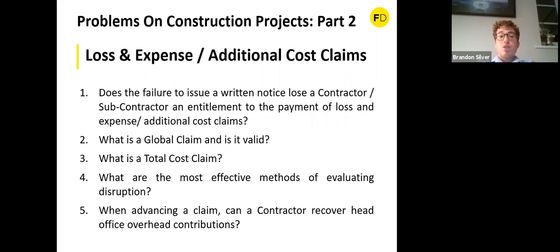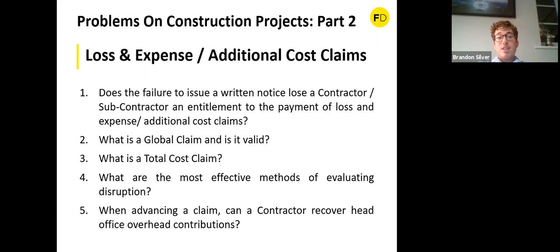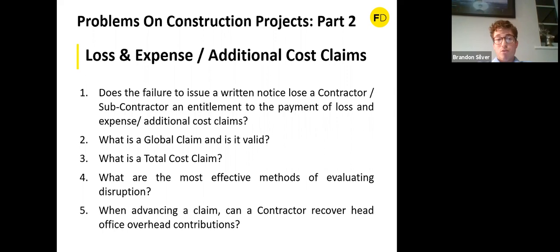The next question: what are the most effective methods of evaluating disruption? Disruption claims relate to loss of productivity in the execution of particular activities — because of the disruption, work activities cannot be carried out as efficiently as reasonably planned. The most effective method is to compare what was planned against what actually happened: establish the planned labour resources from tender, plot them on the baseline programme, then compare against actual resources and actual programme. The difference between the two should reflect the disrupting events.